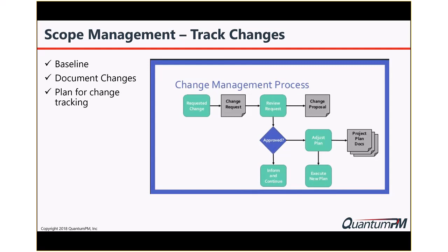Typically not the way you want to go. Usually you want to take some kind of a snapshot to be able to identify those kinds of things. Sometimes it is a start over and you need to do a complete re-baseline, but that's seldom the case. So you may have to just baseline a section of your project. That's a possibility. New features were added. Well, those wouldn't have been in your original baseline anyway, so you need to baseline the new features.